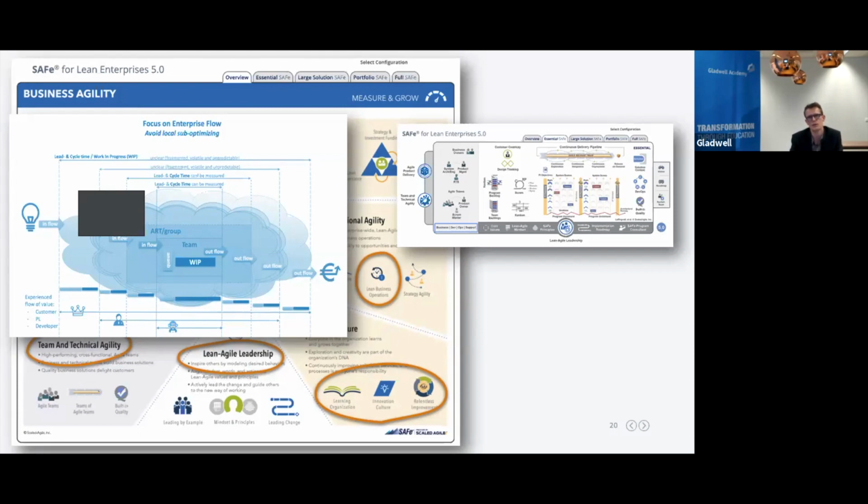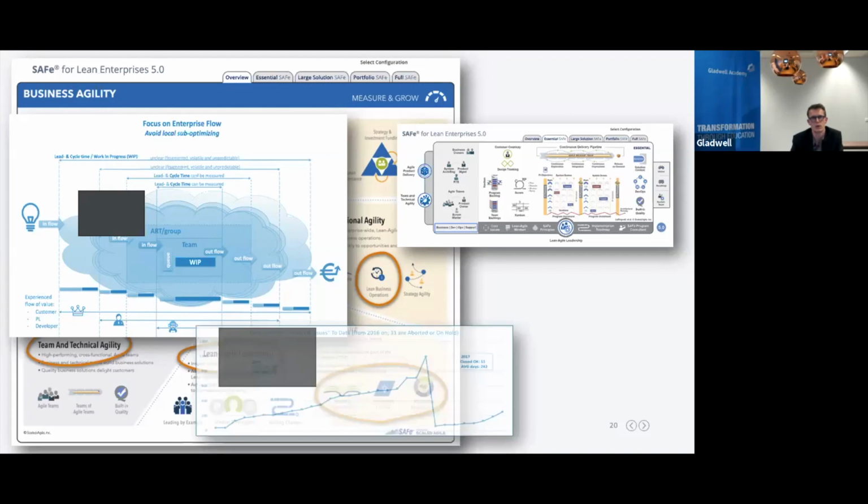So you don't always have to start with a quantitative approach. You can start a more qualitative discussion as well. And later on, you can make things more tangible by making it quantitative, right? By starting to do some measurements. So what I did here, I exported some data from a ticket tracking system, and I was able to come up with lead times and see, okay, how long does it take on average to deliver something? And these numbers were not believed when I showed them back to them.